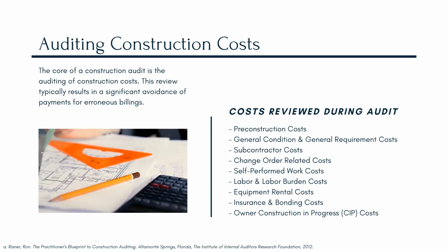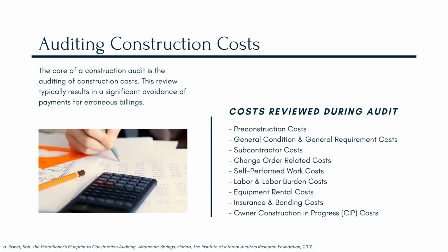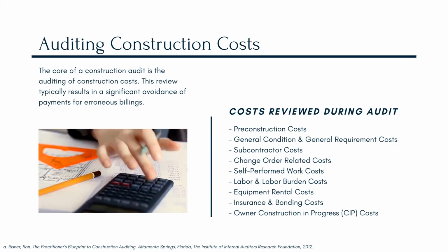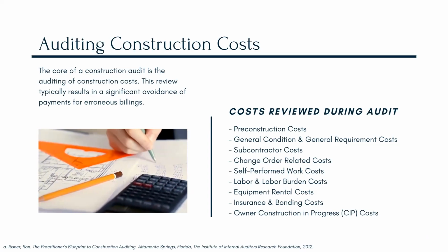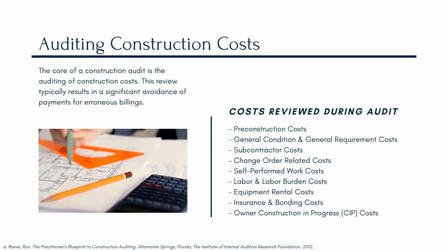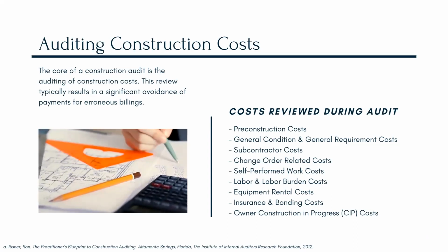And then the final step in the audit work of equipment costs is to make sure that the way the equipment cost was billed was in line with the contract, meaning was it a cost pass-through expectation, or was there a markup allowed contractually to be included on that equipment rental.